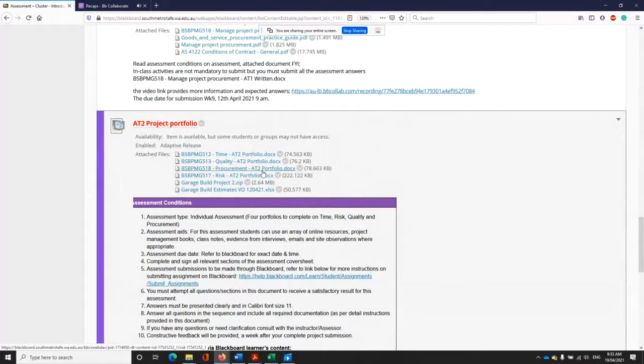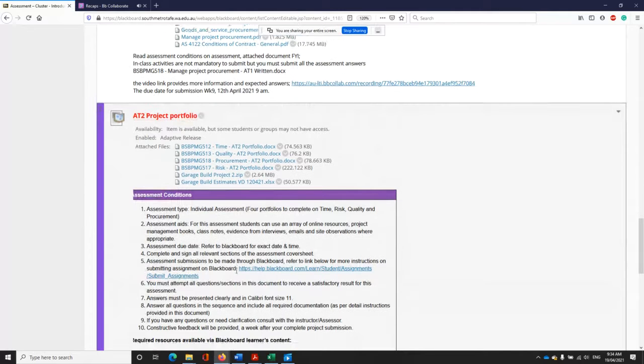Okay, every portfolio I will allocate a particular week. I'll go through the portfolio questions and answers, how they need to be answered. At the same time, we will improve the plan for the project. We'll read and interpret the drawings in more detail, right? We will optimize the plan that we have. My job is to give you a base plan, a baseline plan. Once the baseline plan is there, it is your job to optimize that base plan, right? And then later, if I throw some scenario out, there is a change on the site, you should know where to go and address those changes, and resubmit the revisions as well, okay? That's part of implementation, okay?